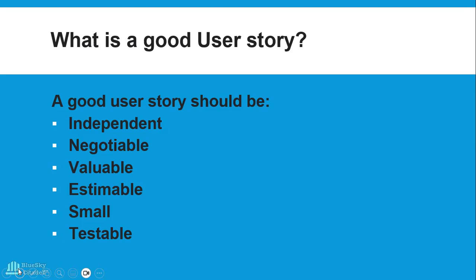Now, your product backlog lists the different tasks or user stories that the team wants to cover or develop. If I put turn doorknob and gain access as my first user story, then retrieve key from pocket as the second, and insert key into keyhole as the third, can you see how I've not put them in the right order? The second step is dependent on the first, and the third is dependent on the second. I first have to retrieve the key from my pocket before I insert it into the keyhole, before I turn the doorknob to gain access. So in your product backlog, you want to arrange stories in order of dependence. If a story is dependent on something else, that something else must be done before you move to the next one.